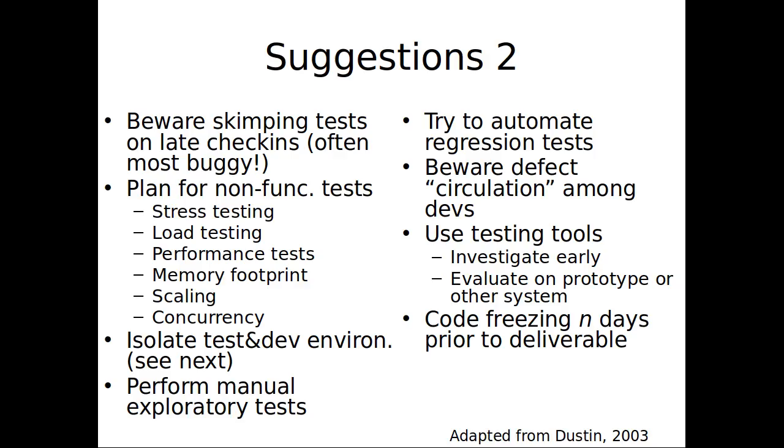And one of the ways is skipping tests. Another one is basically suspending risk management or suspending peer review, saying we don't have time to do peer reviews. In many cases, you don't have time not to do peer reviews. They're going to find the bugs that are going to otherwise cause the fires that are going to make you seem like you don't have time for peer reviews.